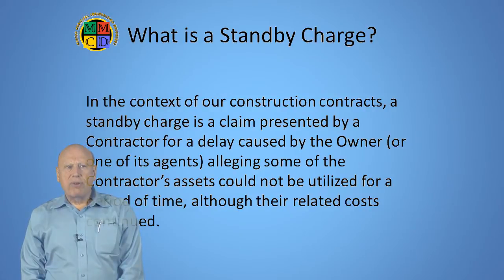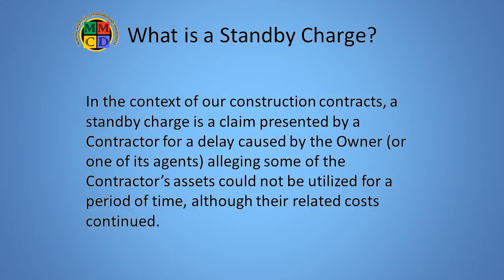First, let's start with the definition. A standby charge is part of a claim presented by a contractor for a delay caused by the owner or one of its agents, alleging that some of the contractor's assets could not be utilized for a period of time, although their related costs continued. Have a look at another of my contract considerations on dealing with delays for a discussion on when an owner becomes liable for delay charges under an MMCD contract.